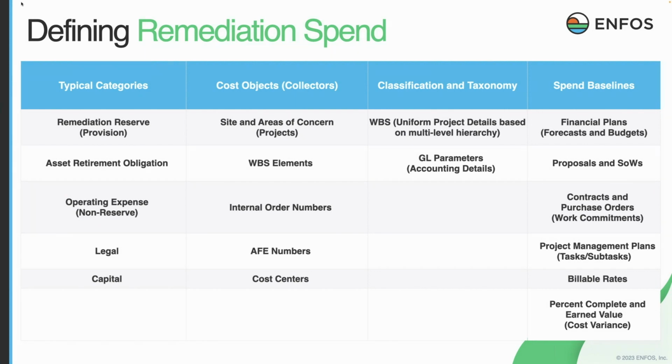Spend, so the actual cost, actual spend comes into play in all of these from a performance management or a performance baseline standpoint. So actual costs, and sometimes I'll just say actual spend, that may, but most times does, reduce the liability for the obligation that's already been recognized. What we'll talk about a little bit later is it's usually not a dollar for dollar, and there are many reasons why that's the case, but it is a metric that can be monitored.